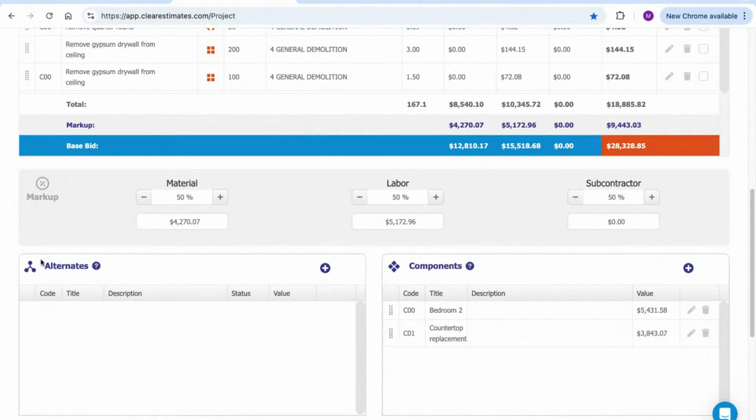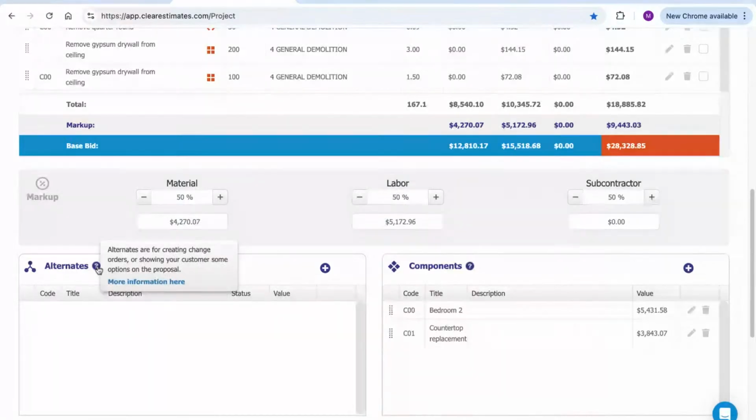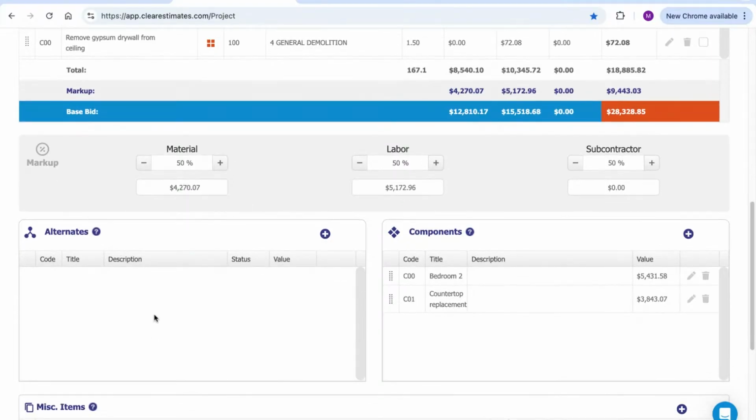And then, like I said, the other thing an alternate will do is just show options separate from your project cost down at the bottom with their own costs. So this way you could show a couple of different options for maybe you had a couple of different styles of decks to build or something like this. You could show them a list of options and you could set that up with alternates. Also seen some clients use alternates to track budgets, also a very common use case for the alternate.